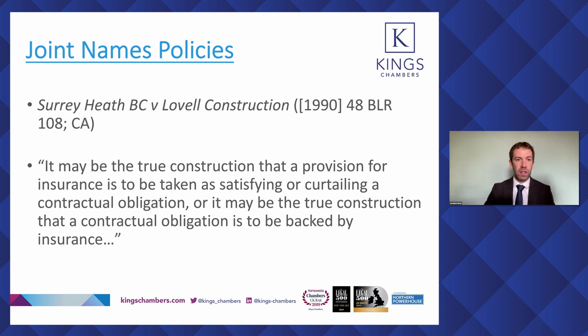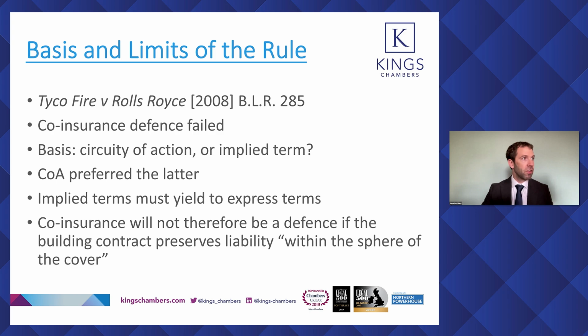The question often is, well, is the obligation to insure replacing or substituting another contractual obligation or liability between the parties to the building contract, or is it merely designed to support it and sitting in the background? And the resolution of that question is often the answer to most of these cases. Rolls-Royce and Tyco. This is a good illustration of the limits of the principle. It's a case where the co-insurance defence actually failed. But it's interesting because of the discussion of the juridical basis of the co-insurance defence.